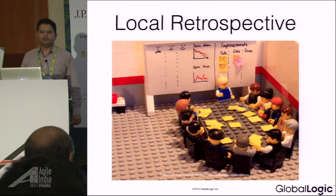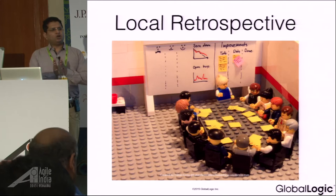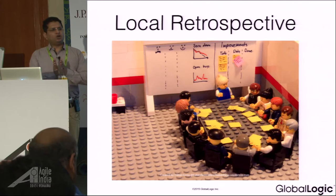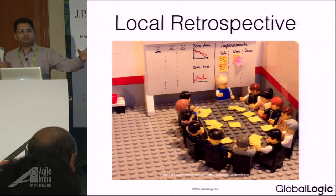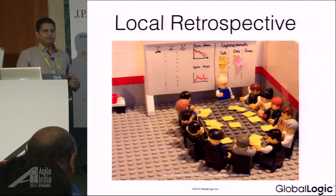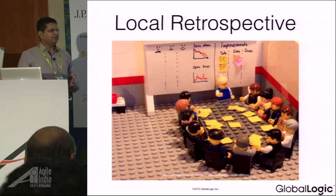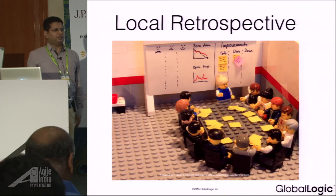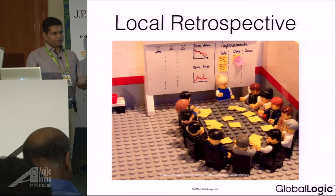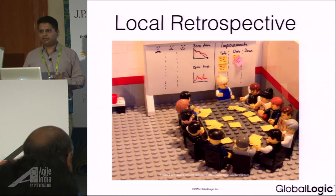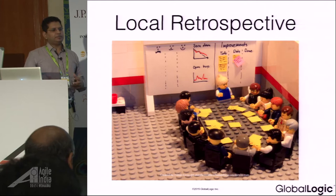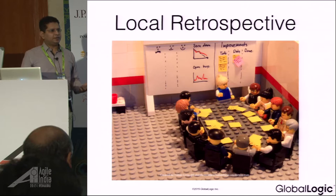Local retrospective — we felt this was very important when we started working as a vendor with a customer in an augmented team. There were some developers in Netherlands and some working from India. The problem is that in a distributed retrospective, you cannot mention local problems to the customer. For example, 'our infrastructure is not working' or 'I have some problems with my team members here' — you cannot mention those in a distributed retrospective. We were feeling those kinds of forces in our team and were not sure how to handle them because we had no local retrospective.